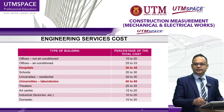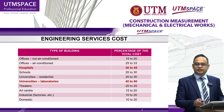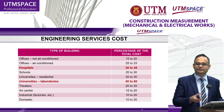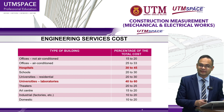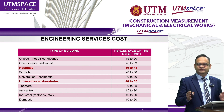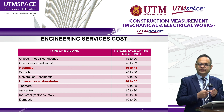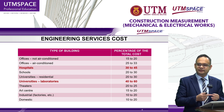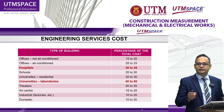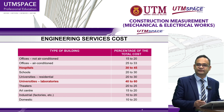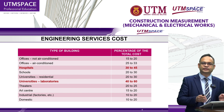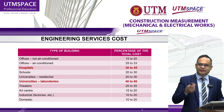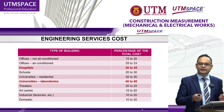Here is another data point from our research. If you are a design team member or a mechanical and electrical consultant, you need to be careful with university buildings. There are three types of buildings in a university: first, the administration building; second, accommodation; and third, university laboratories. Laboratory costs for universities are about 40% to 60%. As a design team — mechanical, electrical consultants, and QS consultants — you need to make sure we manage this systematically.